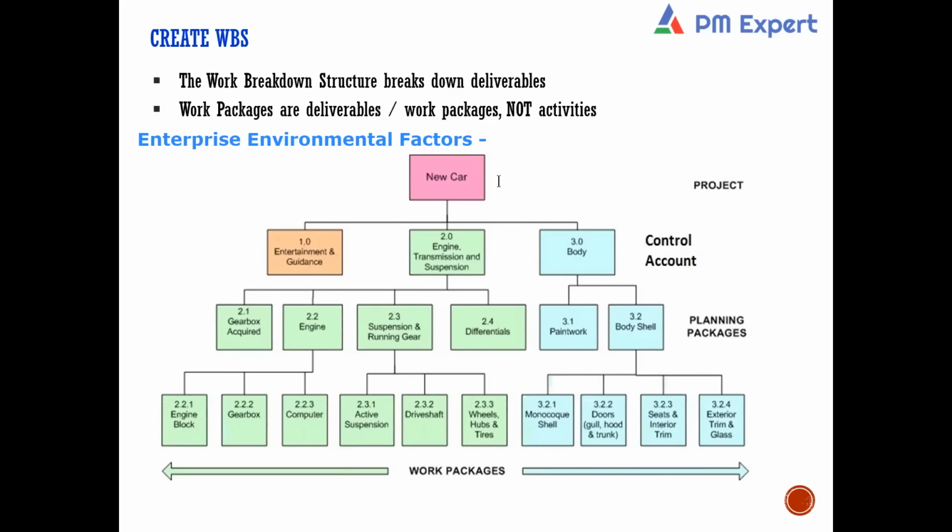See, a car has to fulfill various norms, right? Various regulatory norms related to pollution and all, and some safety standards also. So, principally, if you create a real-time work breakdown structure, will you be putting some additional component for that government-related work or not?